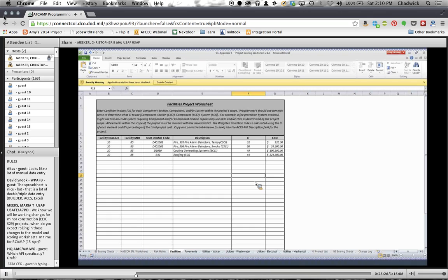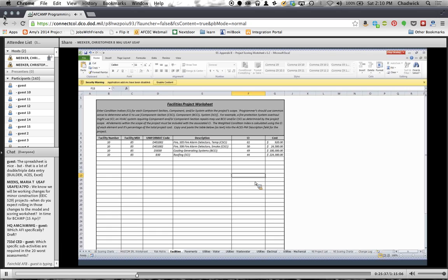Builder does have cost data built in, but it's not up to date. The RSMeans data that it's based off of is not current. So our recommendation is to have your estimators who have firsthand knowledge, who have experience, who have done projects like this, come up with cost estimates for each item and input those values. If Builder's the best you've got, then you can use that.